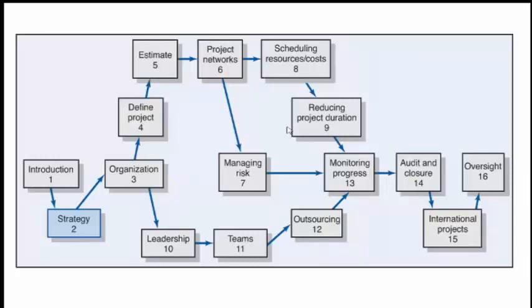It's not that the critical path is created due to the business functions. It is created because of your constraint on the resources. Then you try to monitor the progress of the project by calculating the earned value, looking at schedule variance, looking at effort variance and things like that.